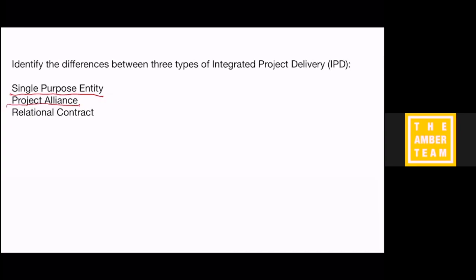And the contractor, likewise, you're not on the site all the time, and even the contractor's not on the site all the time. A new building that's built with poor oversight and detailing might be 20 times leakier than this facility if it were built by someone who is really on the ball in terms of sealing up every hole, for every penetration, for every duct and pipe. So you can make facilities way more efficient as a contractor, even under the same kind of construction document set.